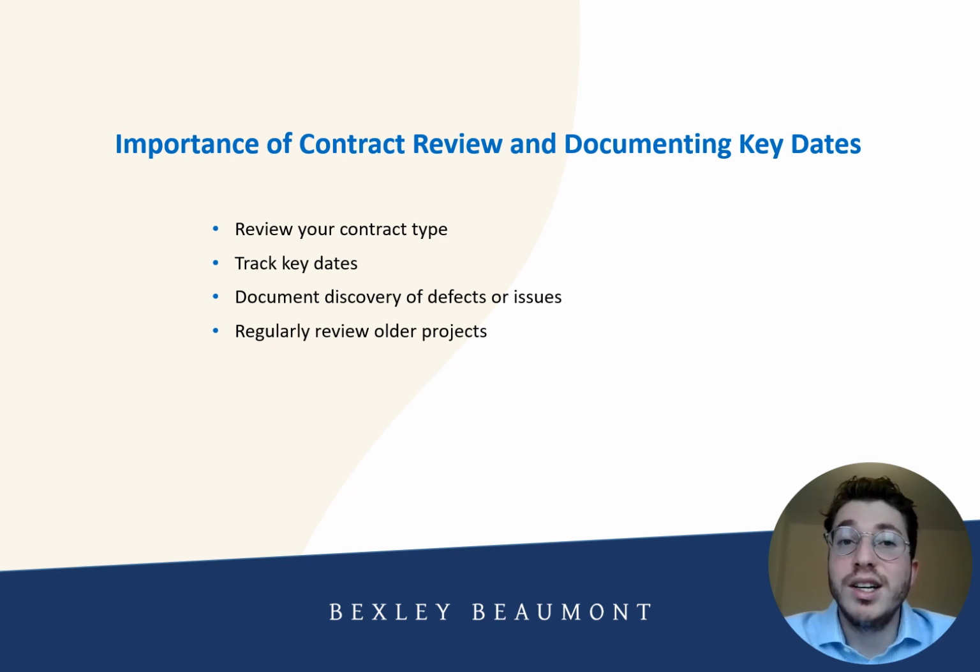Secondly, and importantly again, make sure you're setting reminders and tracking key dates. Set reminders for significant dates such as project completion, substantial completion, and any key events that could lead to a claim, because this helps track when the limitation period might begin and therefore when it will end and when you need to bring a claim in what period, as otherwise you will be time barred.